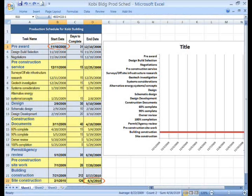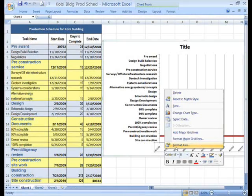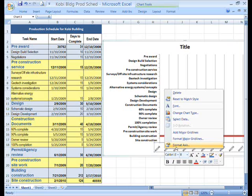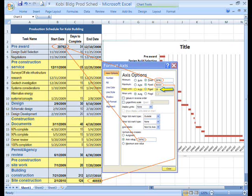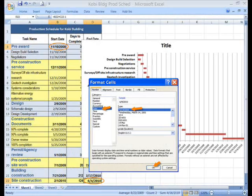We'll begin by changing the earliest date and the latest date to the general format. Next, right-click on the numbers along the bottom to select the x-axis and open the format menu. Click Format Axis. Under Access Options, for the minimum, enter 39762, which is our earliest date. Next to Maximum, type 40333. Next to Major Unit, enter 25. Under Vertical Access Crosses, once again, type 39762 and click the Close button. And now you can change the two dates back to their normal format.